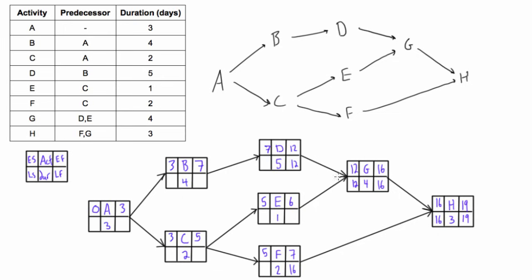We bring twelve to D since there's only one arrow leading in, and twelve minus five is seven for D's late start. Also twelve minus one is eleven for E's late start. Down at F: sixteen minus two gives fourteen. Now leading into C we have either eleven or fourteen — with the backward pass we take the smaller value, so eleven wins. We bring eleven into C's late finish.